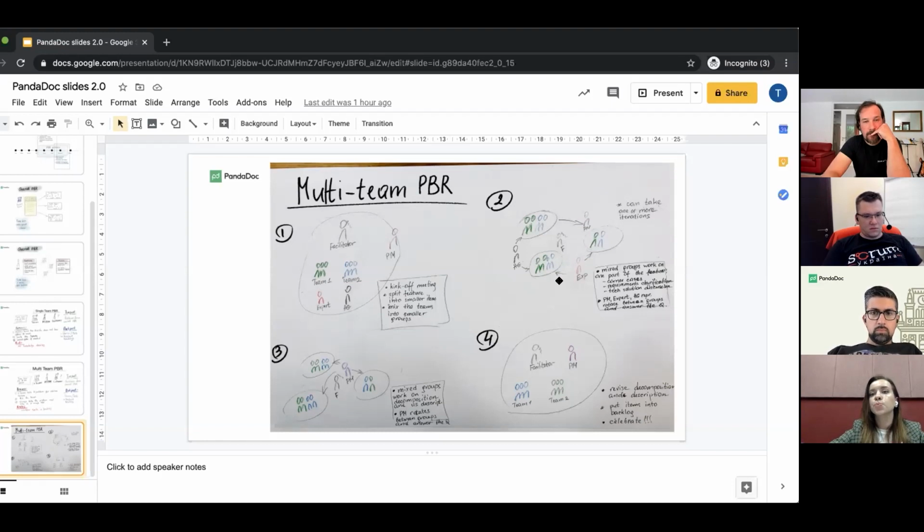Our facilitator, product manager, architecture gate representative or experts rotate between groups, answer the questions, help teams to clarify something. After this job is done, we gather together and refine those things that we've accomplished. So we revise the decomposition, challenge that, add description, and put items into backlog. So that's pretty much it. That's our process.